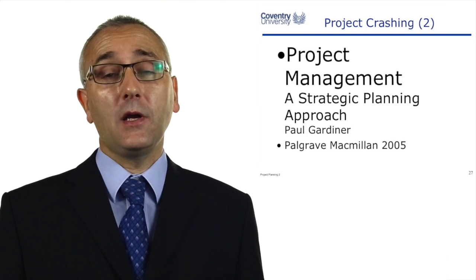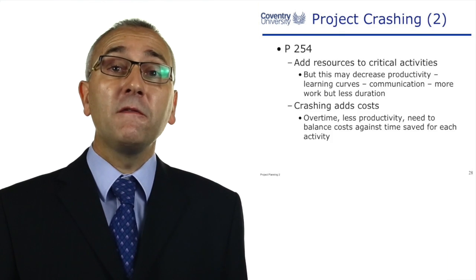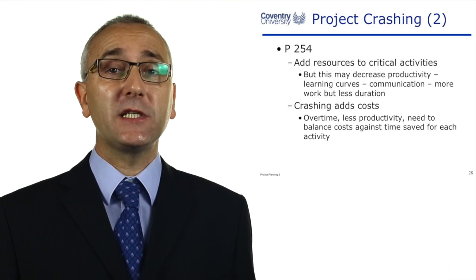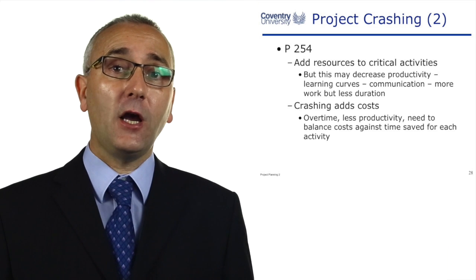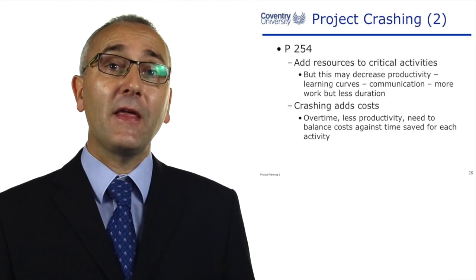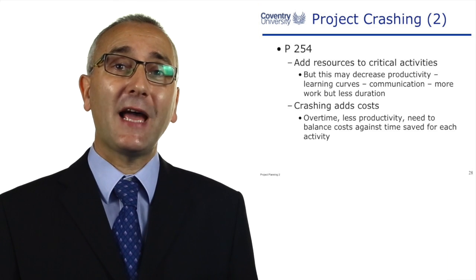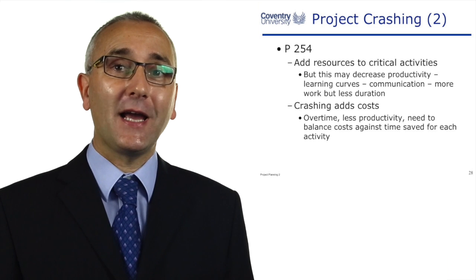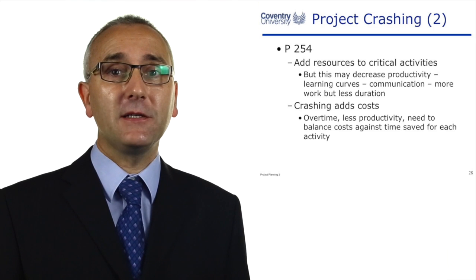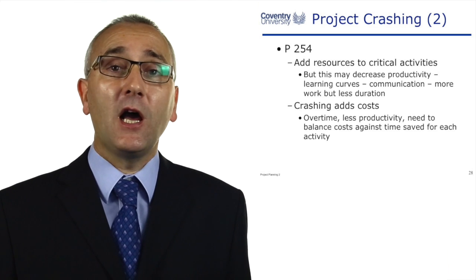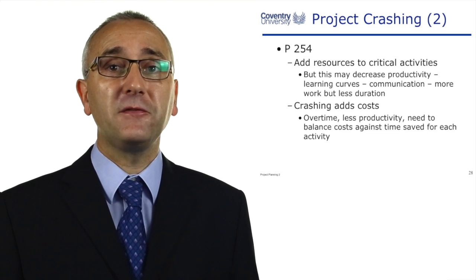Gardner also has a view on project crashing. Gardner suggests that first of all you might look at adding resources to the critical activities. There are effort-driven activities and fixed duration activities — adding resources to effort-driven activities will reduce their duration, but adding resources to fixed duration activities is going to have no effect. A lecture takes 50 minutes; put two lecturers in there, the lecture still takes 50 minutes.